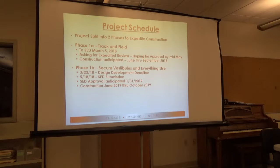Okay. So where are we in terms of schedule? I don't know if everybody knows, but the track project's already been submitted to SED. We had some success there. They said we're logged in, which is a good thing. Sometimes recently they've increased their bureaucratic powers and they hold things for a long time waiting for a little tiny piece of paper. But we managed to go through. And in addition to that, we asked for a third-party review to help expedite the review process. And we're in the queue to see that happen.